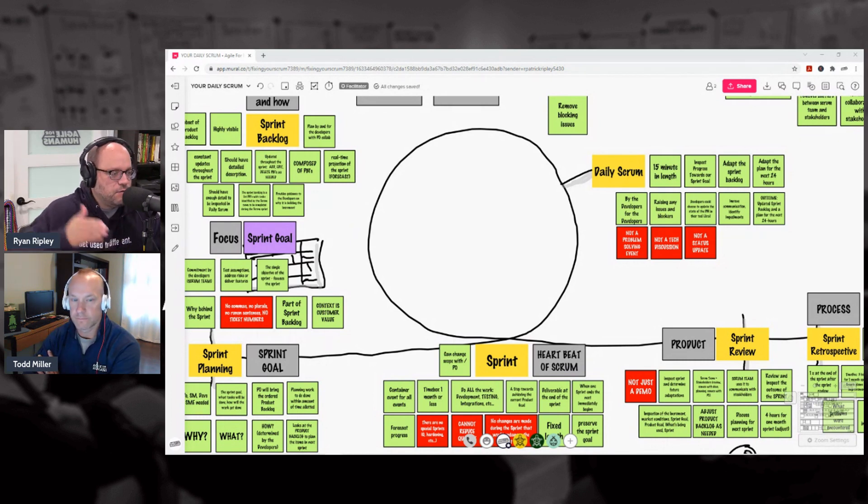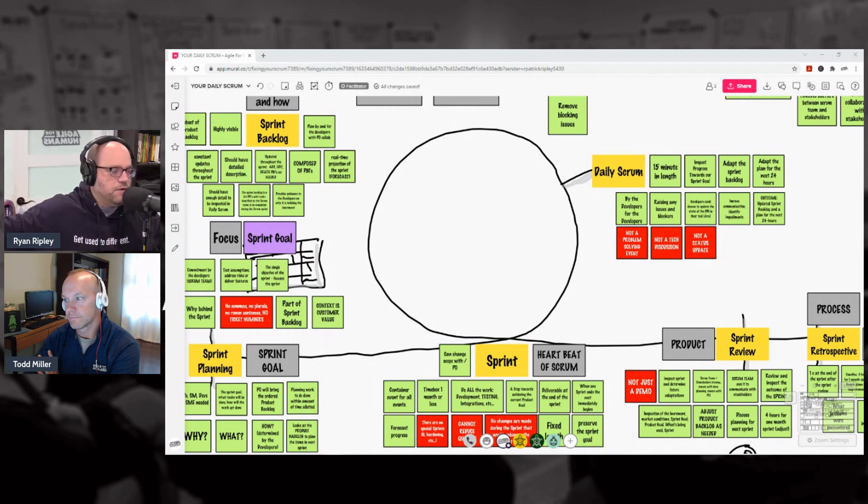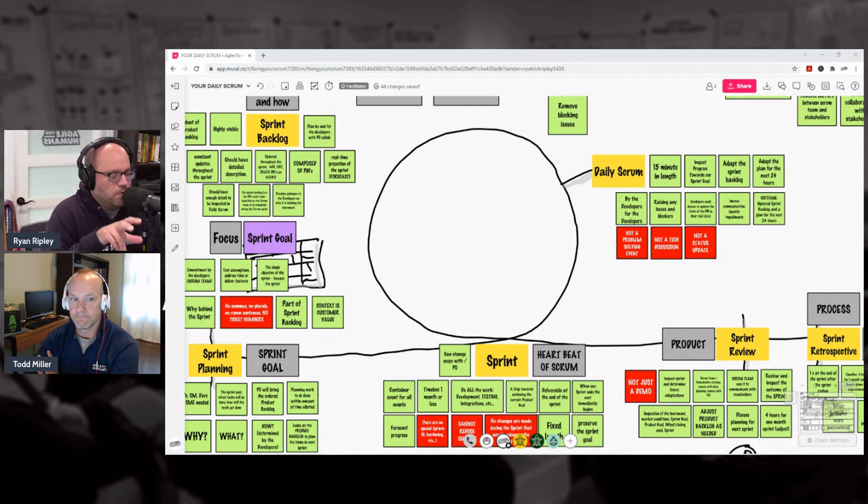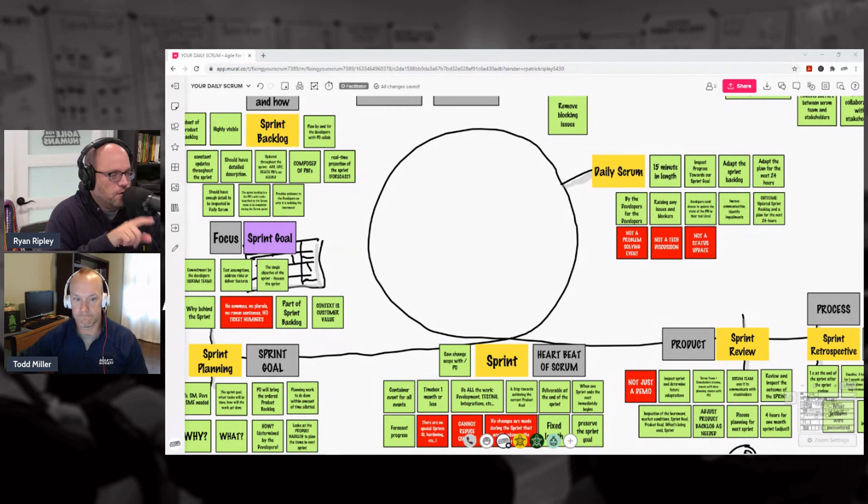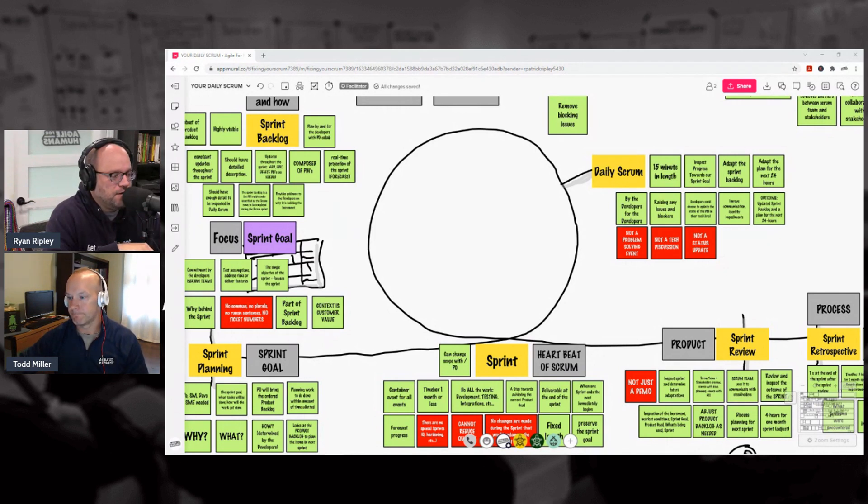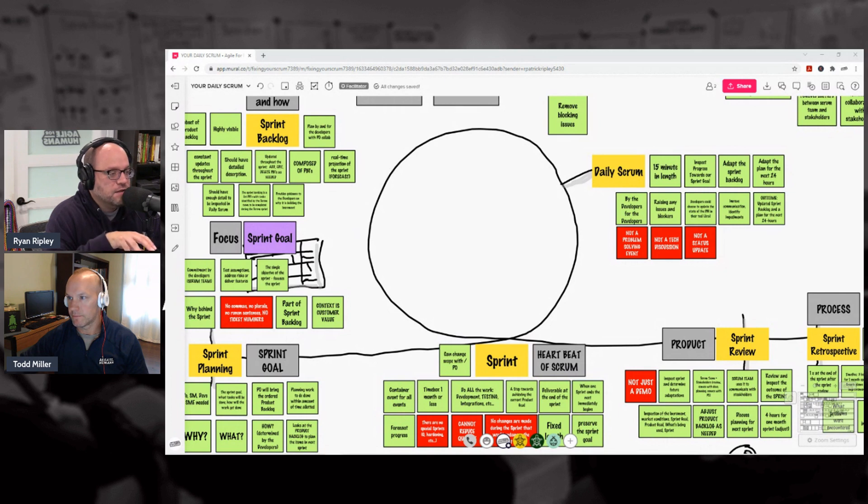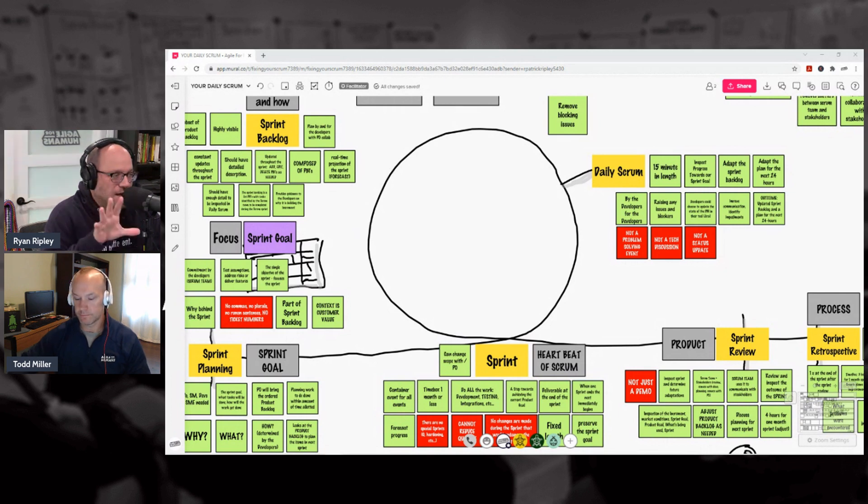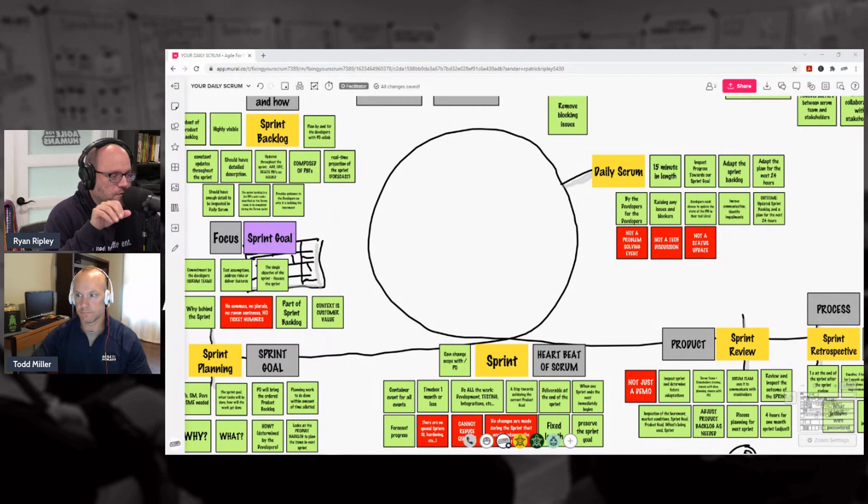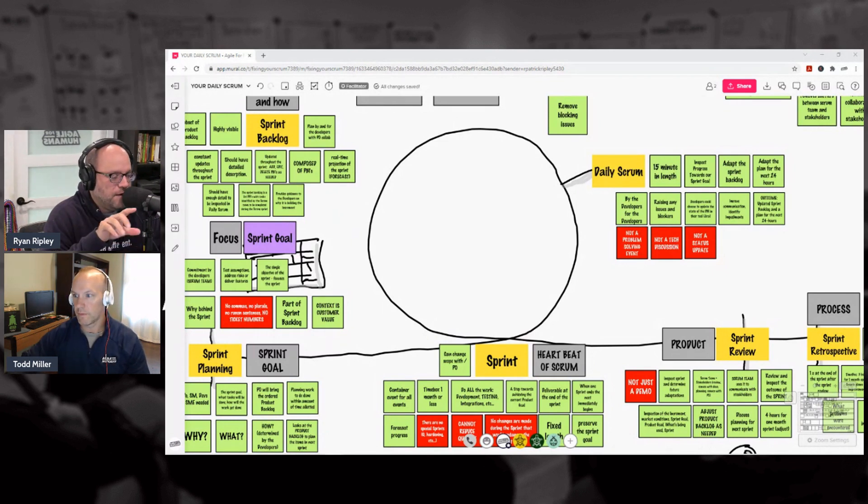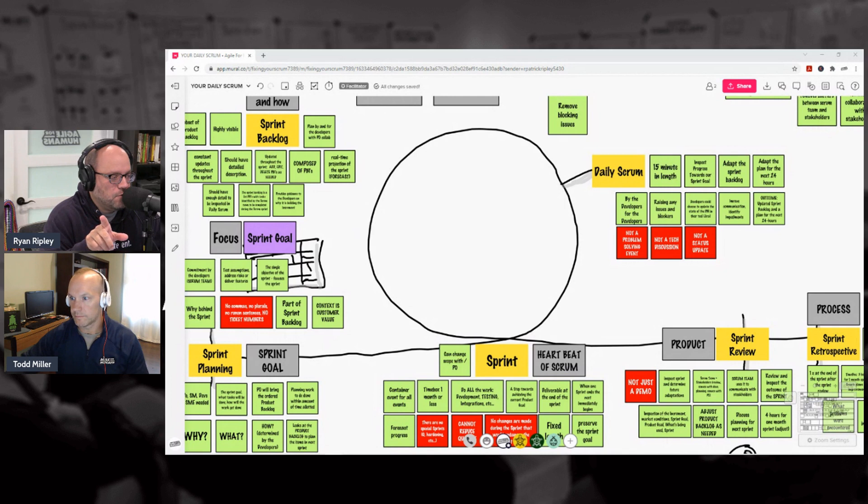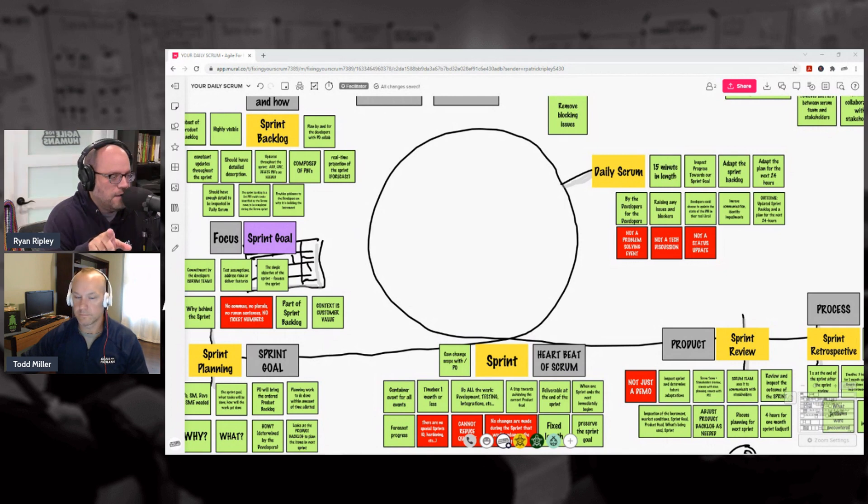Now the biggest question about order that we get: can we do the retro first? And we're going to advise against that. The order of the events is important. If you do a retro and everyone's given high fives and everything is awesome because we're part of a team and all that stuff, and then you go into the review, the Sprint Review, and the stakeholders are angry and things aren't going well, what do you have to do next, Todd?